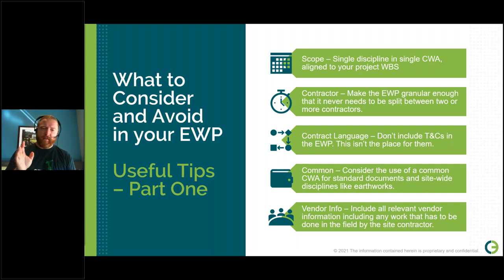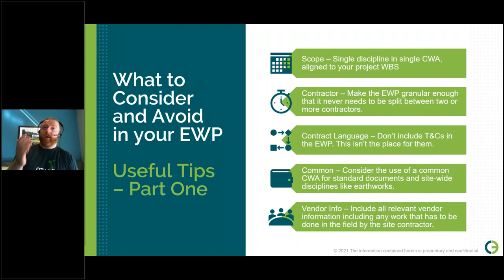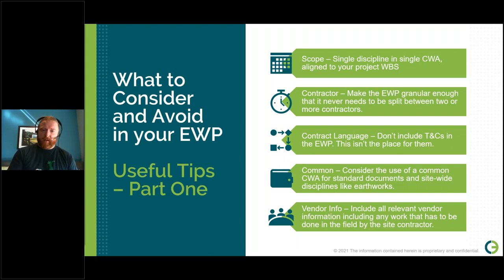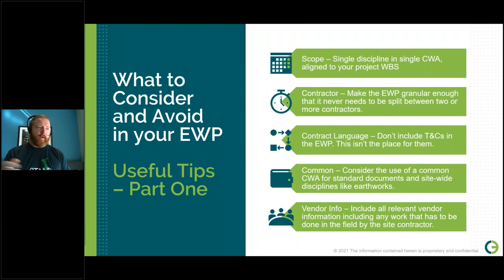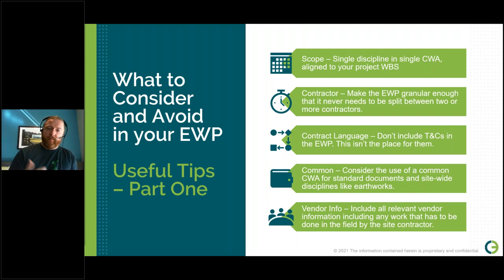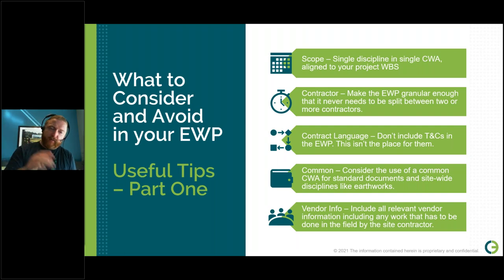Avoid including terms and conditions in EWPs — this is not a legal document. For site-wide scope like earthworks, use a common work area rather than splitting the package across construction work areas. Include all relevant vendor information — particularly what work is NOT being done by the vendor, what is coming shipped loose, and what still needs to be finished in the field. Get that information from the vendor; don't assume.